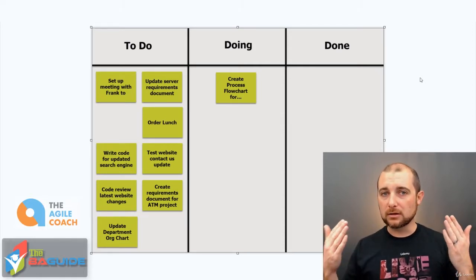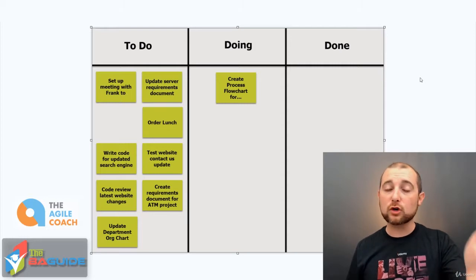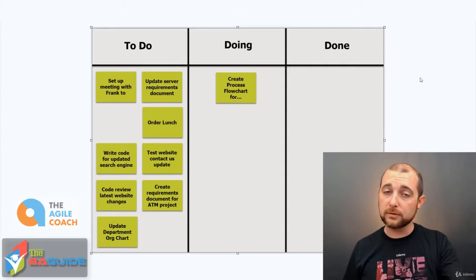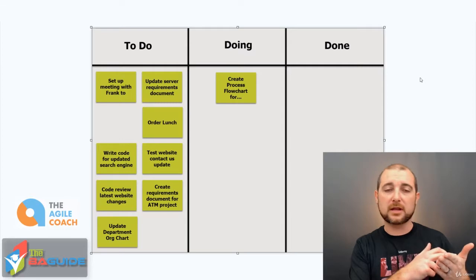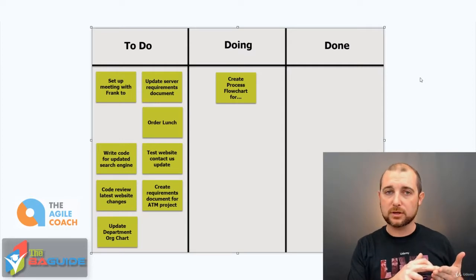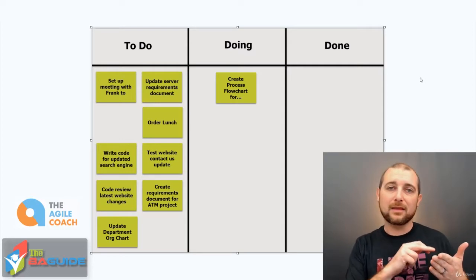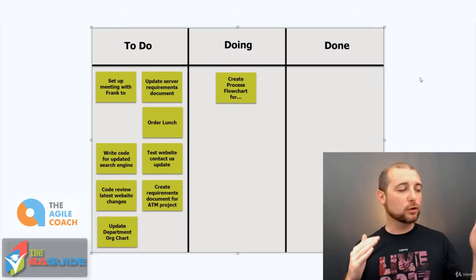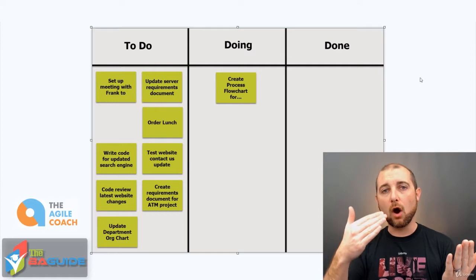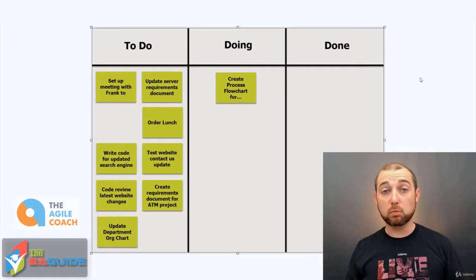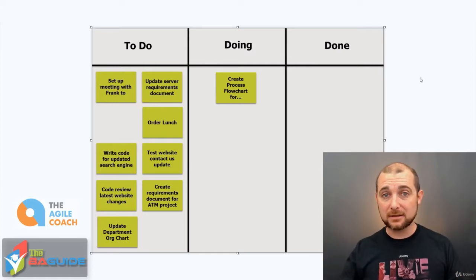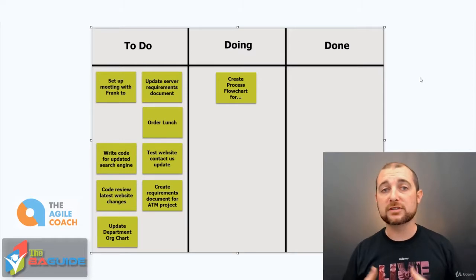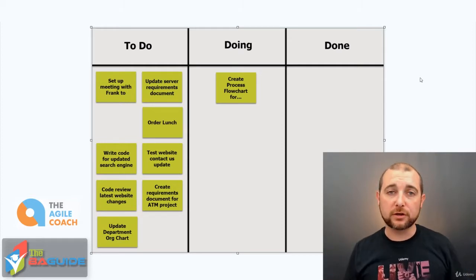I've also seen a lot of organizations that do it that way. When they create the initial card and put it in the to-do column, they do the same thing. They write the name of the person that created the work item, the date and the time, and that it's a status of to-do. So when you look at the back of those cards, you can see the audit trail of what that card did from date to date, or over time, and see how that card evolved and moved through the various statuses. So I've taken ownership of that particular work item.